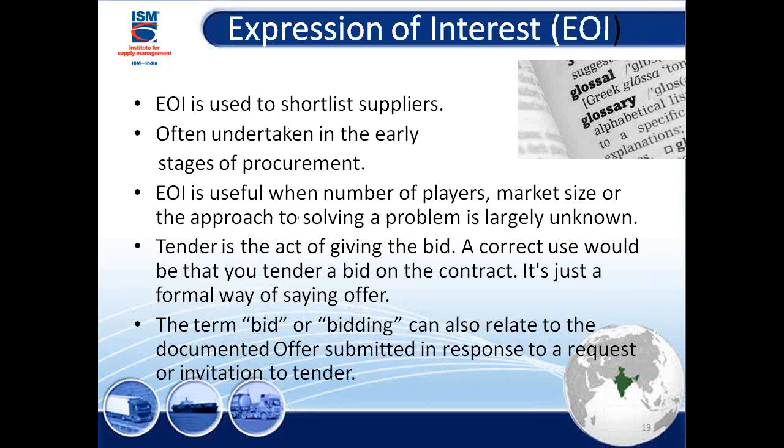Another term is expression of interest. The purpose of expression of interest is to shortlist the suppliers. I remember we used to make catalogs for motor vehicles, for office equipment, for the whole UN family. We would create the list of items we buy regularly. We used to go first to the whole world in every advertisement, every media, every news. We'd say, our volume is so much, $140 million. Those interested worldwide, and we used to pass these requests to even embassies, trade directories, chambers of commerce. We say, guys, come and express your interest.